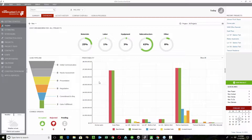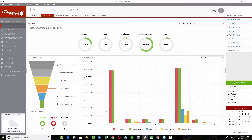In the bottom right-hand corner — well, it takes up the majority of the space — is our profitability graph. For the Premier and Catalyst versions of Construction Suite and above, it shows you the base estimates, estimated value (which is base estimate plus or minus any change orders), where we've started tracking actual costs, invoiced amounts, and committed costs. This example is from a company that does large-scale commercial projects, residential projects, new construction, and a couple of small projects.